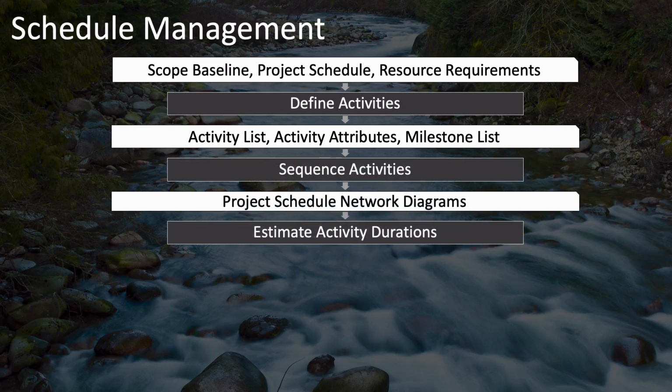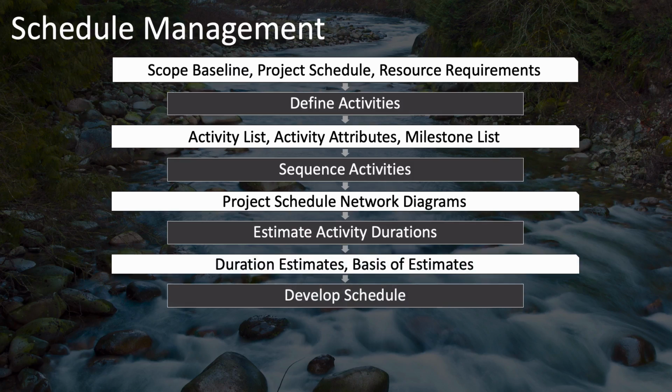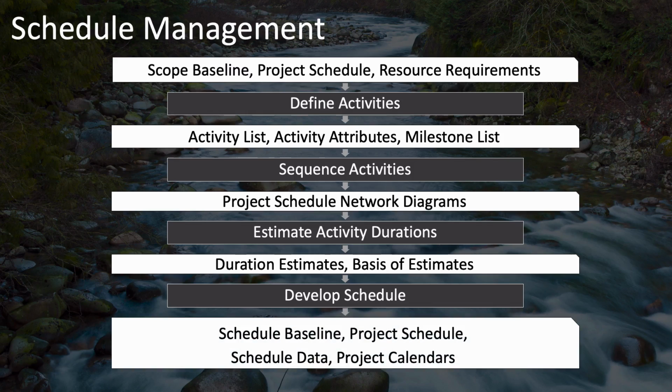Then you estimate your activity durations and output your duration estimates and basis of estimates. And these are inputs to the Develop Schedule process, which creates your schedule baseline, your project schedule, schedule data, and project calendars.